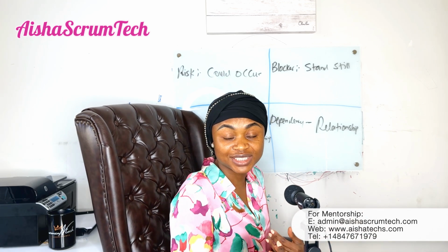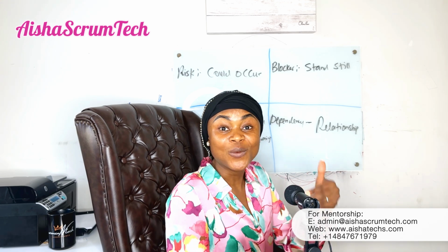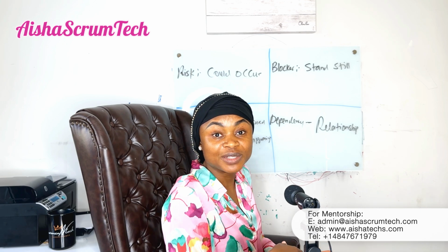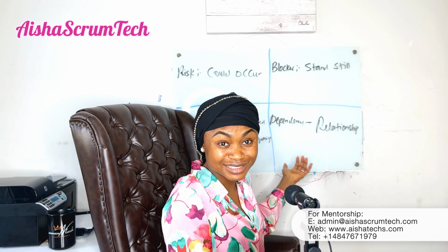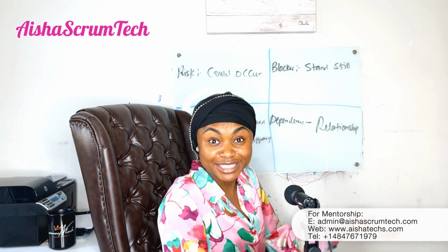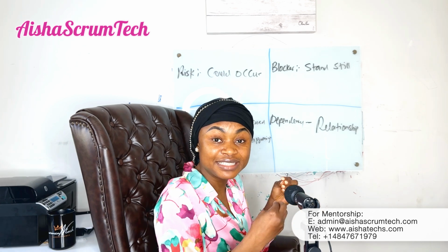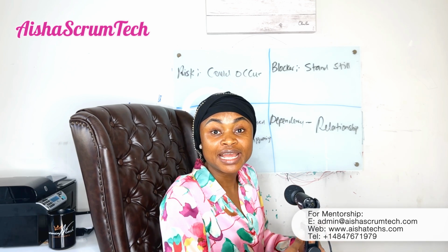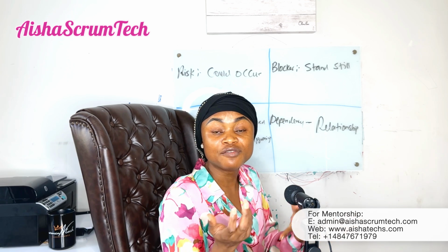If you recall, in the daily Scrum, the three questions we used to ask are: what did you do yesterday, what will you do today, and do you have any impediment? That means, do you have any issue? Because we see an impediment as an issue, something we do not want, something that might prevent us from getting our work done. This can commonly be an access issue or an upgrade issue, anything like that, and it hinders the team member from completing their work. If that's the case, we jump in, ensure the right people are aware, look for ways to help the team members resolve the impediment, and sometimes escalate as needed.